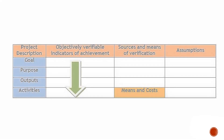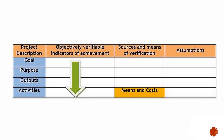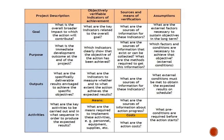I will now give you a description of the whole logical framework, explaining each terminology. Starting with the goal in the project description: you have to write what is the overall broader impact to which the action will contribute. Similarly, what are the key indicators to achieve that goal, the sources and means of verification, and the assumptions as external factors for the sustainability of the project.